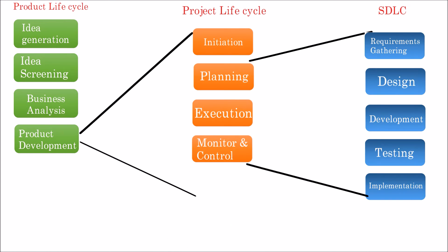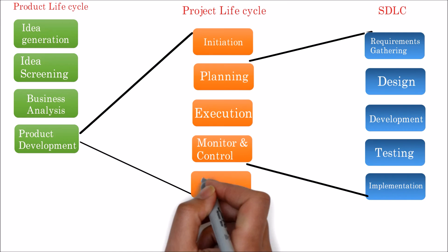Normally, the entire SDLC will be contained within the planning, execution, and monitor-and-control phases of the project lifecycle. One important point: we can't exactly define at which phases of the project management lifecycle the SDLC process will fit, as the SDLC process might or might not overlap based on the selected software development methodology. Here, I've made an assumption of a waterfall SDLC methodology. The system development and launching process starts either at the planning phase or slightly before that, goes through execution, and finishes at the monitoring and control phase — at which point the SDLC lifecycle ends.